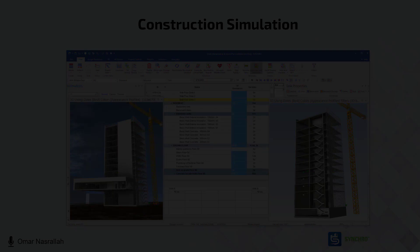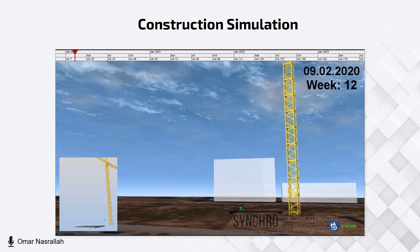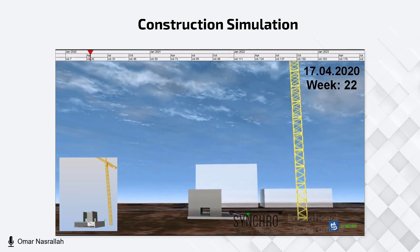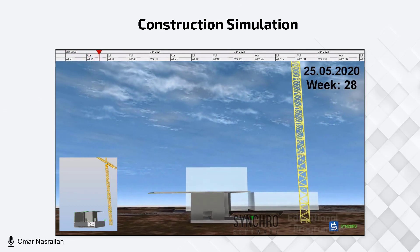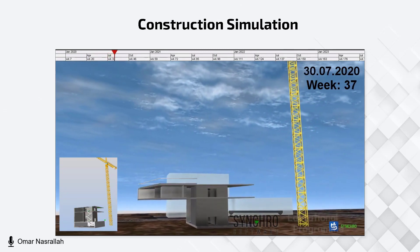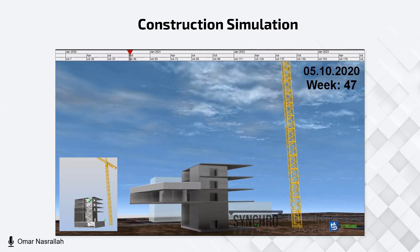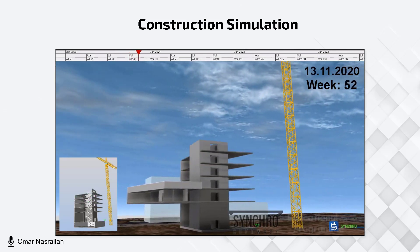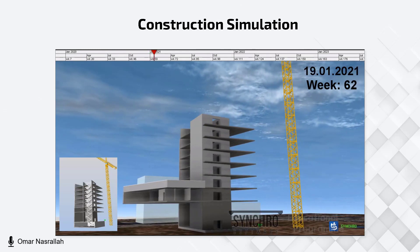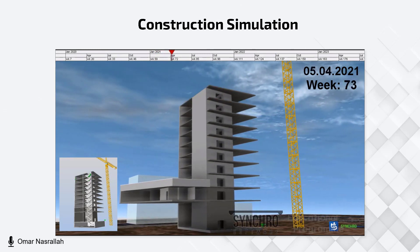Moving to 4D and 5D, we imported our model in open BIM IFC format into the designated software — Solibri and Bentley Synchro — to extract needed information including quantities, classifications, rulesets, and more. We identified all classified and unclassified elements in the model, enabling proper model validation as part of the BIM uses mentioned in the BEP. After model validation, we extracted quantities, materials, and all related elements, scheduling the information in Excel to create a pricing schedule and bill of quantities. Each item was filtered based on floor level, material, price, and space, giving both us and the appointing party clear knowledge about project cost and quantities.